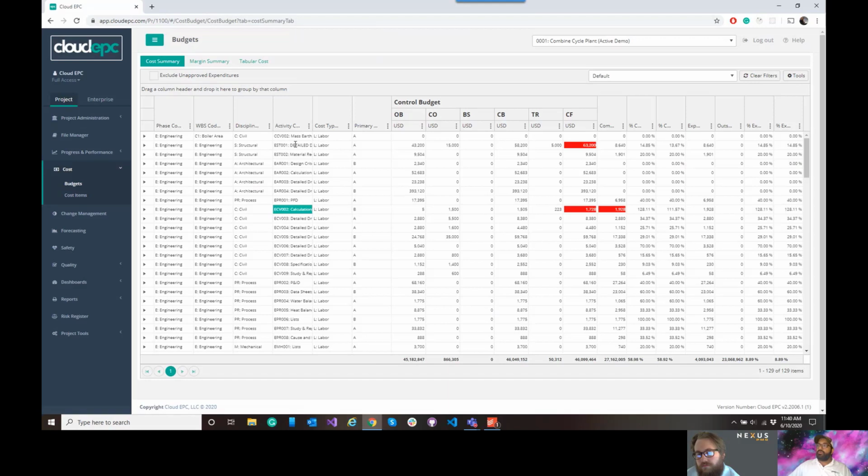And so using our export to Excel coding and then re-import, we have these group fields. We have 3 that hang off of the activity and 3 that hang off of the cost type, but we can quickly remap these data sets into really anything we want. So let's assume we had contractor A and contractor B, or for whatever reason for an owner, we need to re-cost code everything by their asset number to give them an as-built costing by asset.